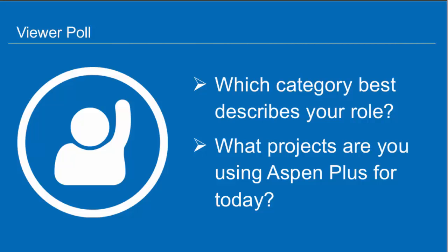Okay, so the first question is, can you explain the differences between the estimation tools in Aspen Plus versus the economic evaluation software title? Yeah, certainly. We have three different economic products. We have one called Aspen Process Economic Analyzer that's designed for process engineers to do early cost evaluation. We have one called Aspen Capital Cost Evaluator. That's used by estimators to do high-fidelity cost estimates for new plants or new sites. And we have In-Plant Cost Estimator to evaluate the cost of smaller projects.